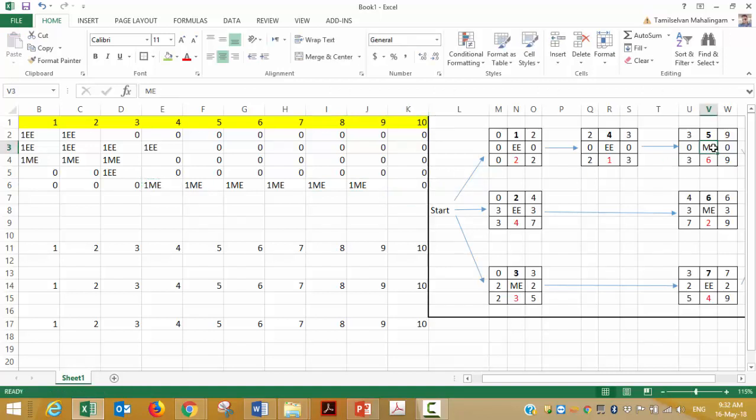Okay, so I need a mechanical engineer for 6 days. This is the duration, right? Don't copy on the third one. Remember I said just add one more here, because the first 2 activities take 2 plus 1, 3 days. So this one can start only on the 4th day. So put it from the 4th onwards. The 4th is also counted. It's not 4 plus 6, because 4 is counted, so we need to count 4 as well. So it will go up to day 9.